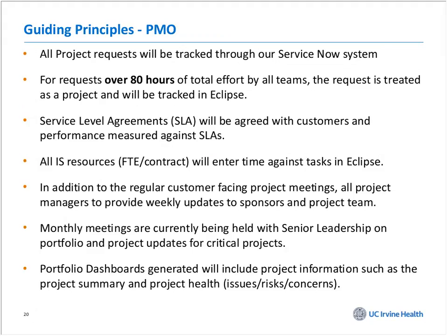Service level agreements are created. We enter all of our time against everything that we do, all of our people, so we know who's available and not available. We also know who's working on what and how much time they're spending. That's key to a good PMO.